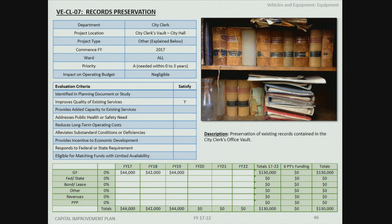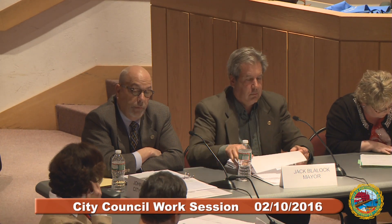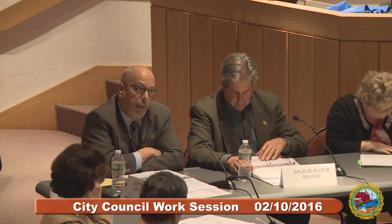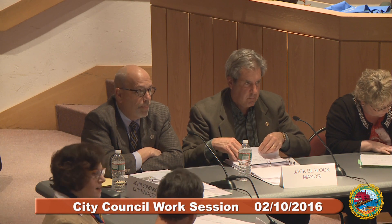A council member asks whether proceeds from selling or trading in old vehicles are factored into the capital plan. Staff explains that proceeds from trade-ins or separate sales typically go back into fund balance as anticipated revenue, or are credited against the purchase price as a trade-in.